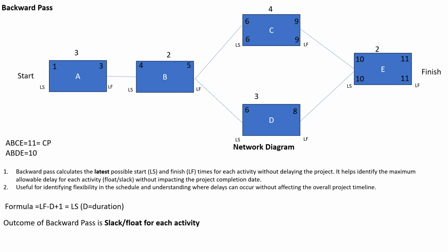Let's go to activity D. Here we have the late start of activity E on day 10. That means the 10th and 11th days were both utilized in E. So activity D has to be completed, so the late finish for this activity is 9. And the late start, with the same formula, 9 minus 3 plus 1, is 7.